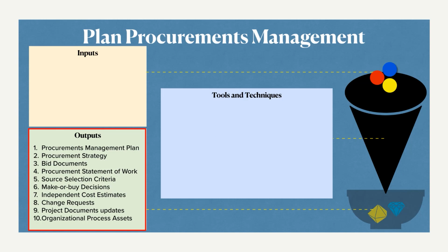Next thing is the procurement strategy. The main purpose is that we have to determine how we are going to perform the procurement through different phases of the project, like the delivery methods, the payment contracts, and phases within the procurement itself. The procurement itself again has phases similar to the project, right? So first they give only 50 numbers, and then they give 100 numbers, and then they give 200 numbers. Just an example of how these phases work.